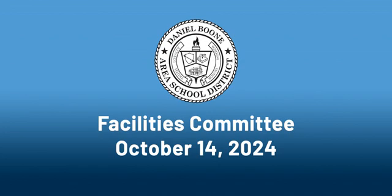All right, we can move on to the second item, the walk-in freezer compressor replacement at the primary center. During my previous inspection at the primary center a week and a half ago, the walk-in freezer went down, stalling everything out. We were having some major issues with it. I did get 2 quotes from both of our vendors that we work with, that are both CoStar vendors, Clarkson and K&D. K&D is a little over $2,000 cheaper. And these typical compressors come with a 5-year warranty.